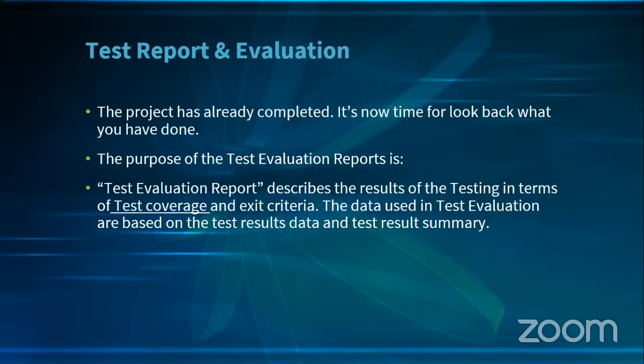So just one page to give a simple overview of what you've tested for the day. Just do it. Your test cases are already there. Extract the reports of your test cases to say X number has been achieved today, and these are the defects that we have. Day 2, just change the date, change what has been done, and you continue the same phase. By the time you finish testing, everybody knows what you're doing already.